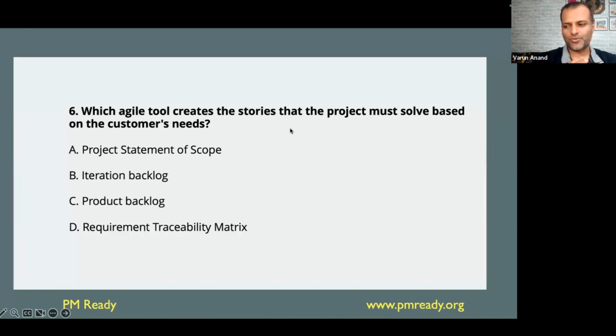So how would I write a user story? I would say, as an actor, the person who talks to the product. So, as a customer for this bank, I should be able to, and then you write a particular feature, what you want to do. I should be able to withdraw the money, so that, you need to give a reason why you are doing it, so that I can have a good, happy dinner party with my friends.